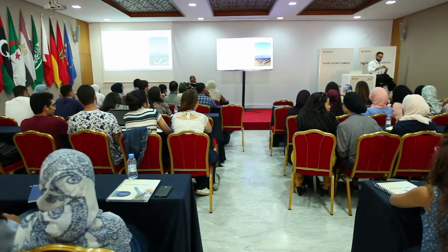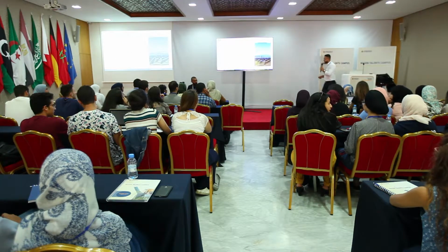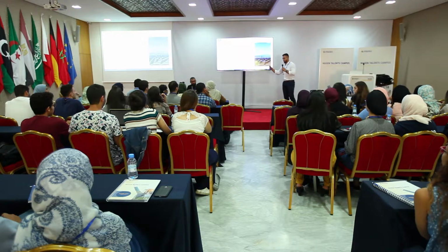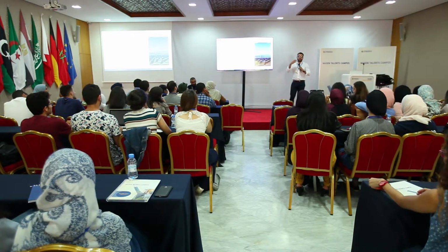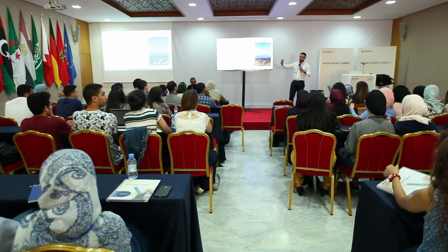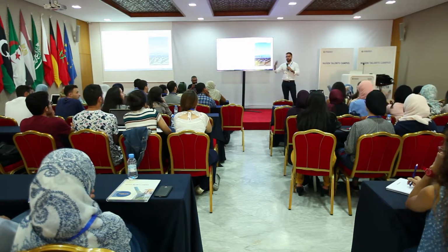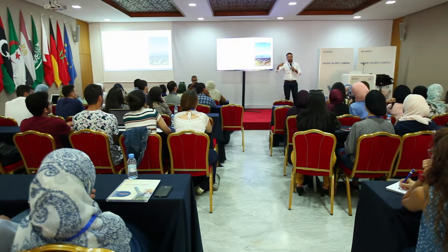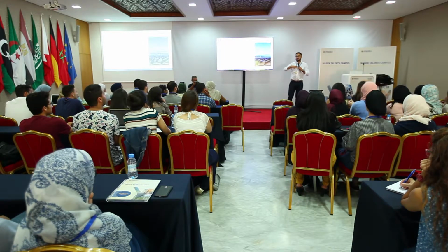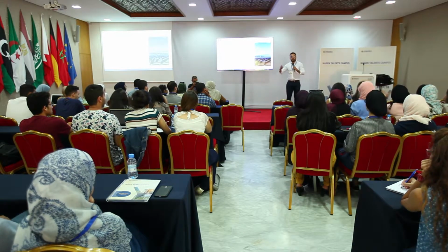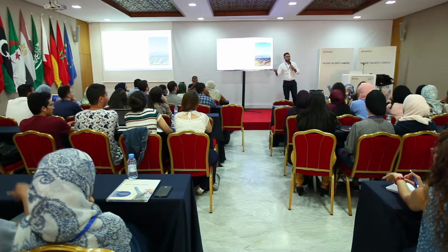Then in the second and third projects, NUR 2 and NUR 3, which were a common tender, you see how Masen learned way faster. The first expression of interest was launched in January 2013, and in 2 years we already had financial closure. So all of this experience gained by Masen showed in the latest 2 projects. The same could be seen in the cost reduction. Masen was now seen as a more attractive country to invest in. The first project was awarded in 2012 for $189 per megawatt hour for a 25-year contract, and the second and third were around 140 and 150.